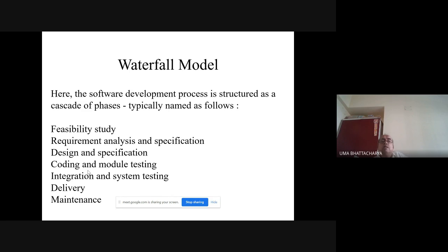So that's why in the bidding process, at least in software cases, there is a two-step process: technical viability and financial viability. Technical viability is done first, and then financial. So the feasibility study has to be done very carefully.